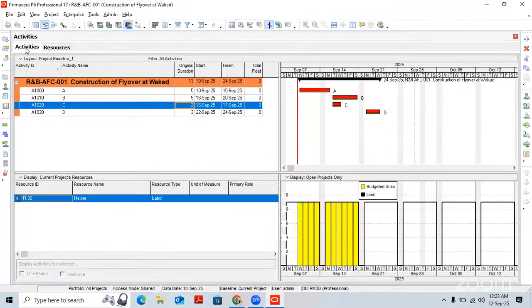Minimum labor strength should be this much, because at the time of resource allocation in Primavera, we usually calculate the resources based on the quantities. When we allocate the quantities, we don't use a curve, we use linear distribution. Linear distribution usually does not happen on site. Either we have to gradually increase the resources, or it depends on front loaded or back loaded. So the demand for resources is practically different and theoretically different.